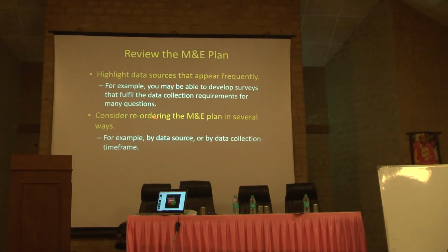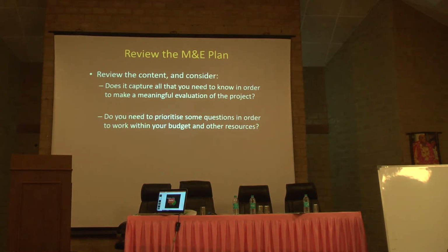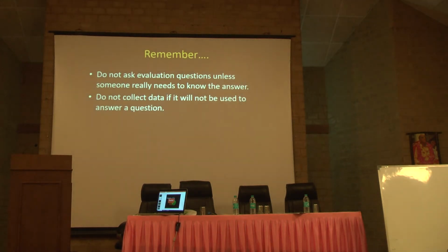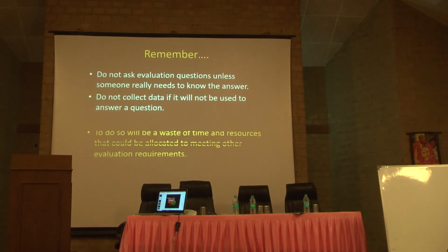So, as I said, we're going through this very, very quickly because we don't really have a lot of time. But don't ask evaluation questions unless someone really needs to know the answer. Do not collect data if it will not be used to answer a question.